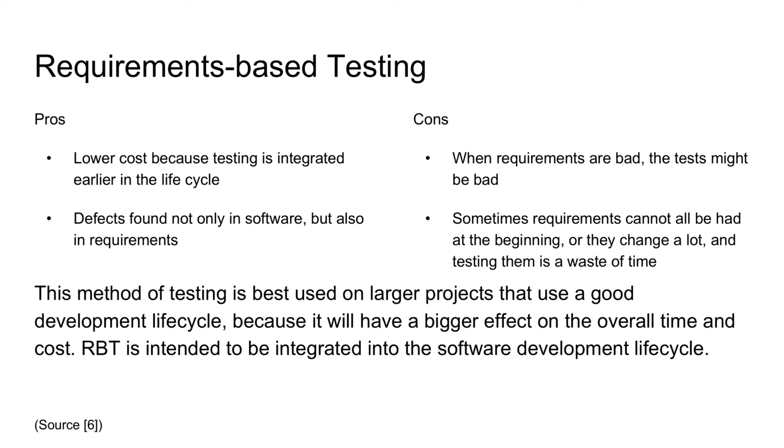Sometimes, however, it is arguably a waste of time to create test cases for requirements. The reason is because some people believe that some projects cannot elicit all the requirements at the beginning. As a result, requirements often change a lot during the development lifecycle of the project. Testing requirements that change would then be a waste of time. Also, bad requirements sometimes have the effect of creating bad test cases. Therefore, this method is best used with projects and teams that can elicit all the requirements at the beginning.